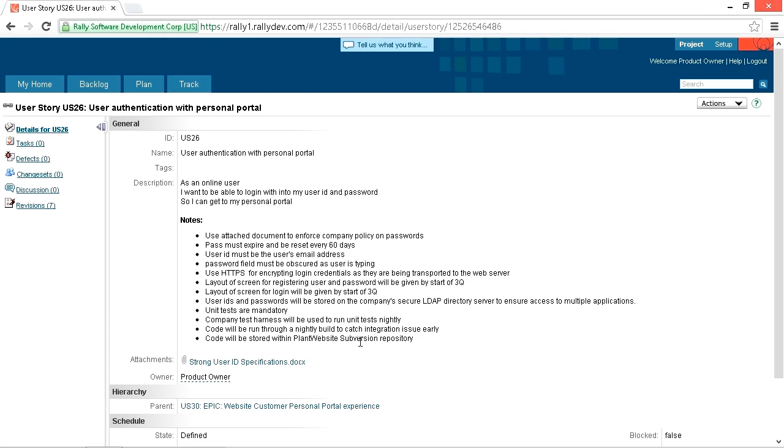Well, there's just way too much information here. There's no room to negotiate. And this user story includes a lot of hows, which is a violation of the Scrum rules. Remember, the product owner gets to say what is going to be developed in these user stories, but the team gets to say how it will be developed. If there's too much information in the description of the user story, it cuts off the conversation. The team has nothing left to ask. Everything's documented. It becomes just the old school way of writing requirements with no collaboration opportunities between the team and the end user or the stakeholders.